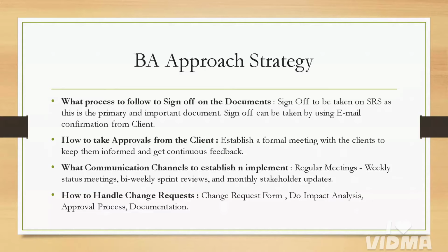Once the project is initiated, if the client comes to you with another requirement which is already implemented in the project, which can be considered as in scope, okay. So we should note down that requirement or change request, and we should take the permission from the project manager, and we should conduct the impact analysis and estimation.